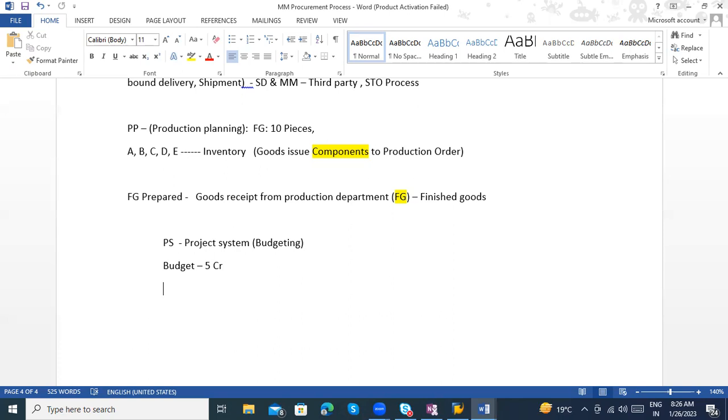So what we'll do, I will be dividing the activities first. Like maybe I can say first ground floor design, ground floor building, ground floor construction. Again, in the ground floor construction, what we have: pillars, removing the sand, and building a floor. So all these activities will become part of it.